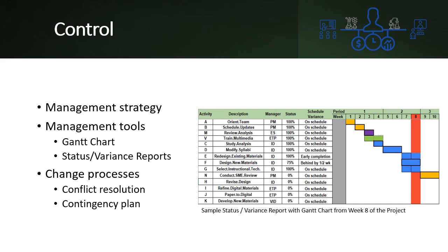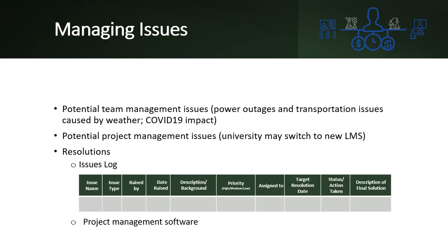The project manager must anticipate change and instability in the project and among team members. Therefore, we have included a conflict resolution plan as well as a contingency plan for identified risks. For this project, one risk might be time pressure on professors in the chemistry department that might delay expert reviews of project design and materials. Another risk could be differences in levels of competence in using technologies for educational purposes.